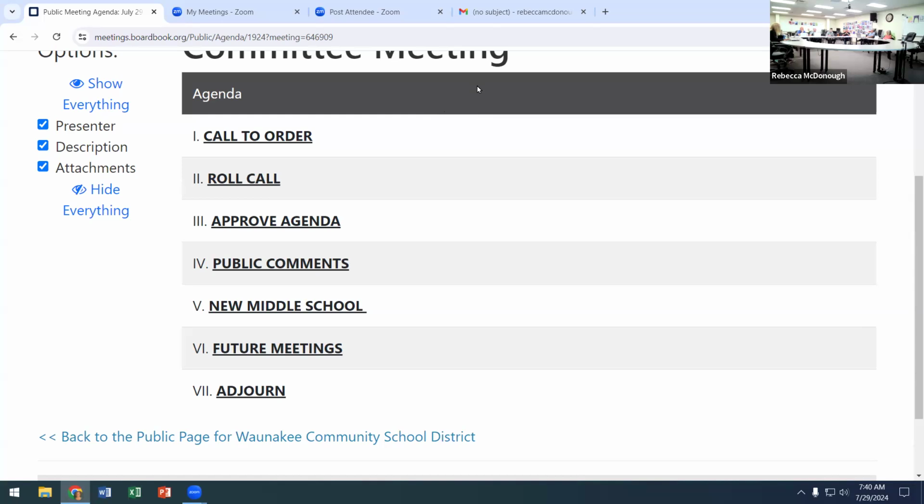So it's an unfortunate discovery, which we would have found earlier, but we didn't. It wasn't like it's floor tile underneath a flooring material or pipe insulation running down there. It was one of those things that was just difficult to find, and we didn't see that. So we worked with Robinson Brothers on getting pricing for that. Got a credit back from them on the limited amount of work that they had in the gym.